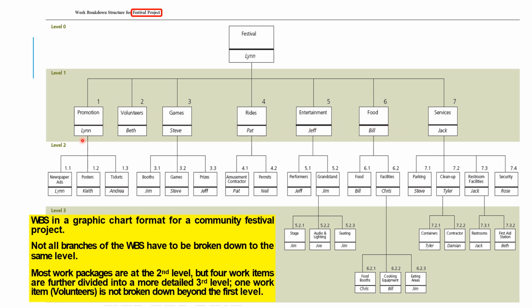Then from there you can see they break down into more smaller things. Then you label it 1, then break it down 1.1, then 1.2, 1.3. Then 2, same also, but 2 doesn't have any breakdown, so not it. Then go to 3, you got 3.1, 3.2, and 3.3. And you see some projects can go to 5.2.1. Some projects you can go to 6.2.1.